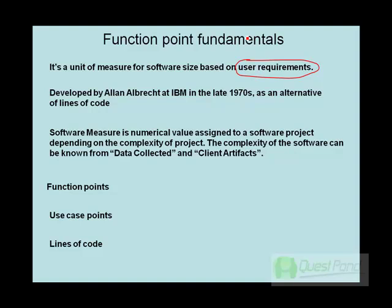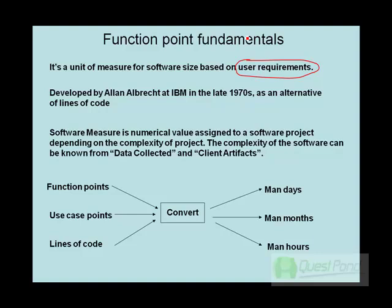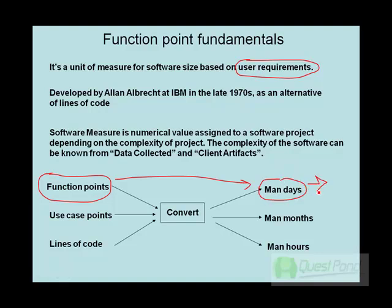Your software measure can be function points, use case points, lines of code, or some other number that identifies the complexity. These numbers can then be fed and converted into a proper number which we can use to do estimation, or to arrive at a monetary factor. By these numerical values you can get man-days, man-months, or man-hours. The whole point of this exercise is to understand how we can calculate function points and then convert them into man-days so that we can arrive at an amount for billing your customer or preparing a proposal.